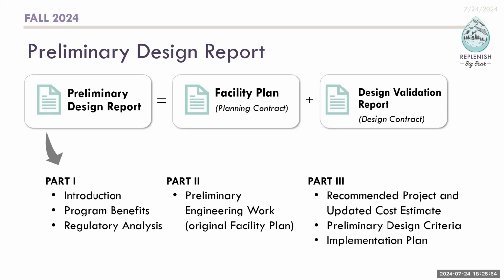So that cost estimate point in the PDR, fall 2024, I imagine would be, David, I think you mentioned earlier, another kind of pause point in discussion with the board. Yeah, so we'll be able to present back that design validation report to the board with an updated cost estimate.